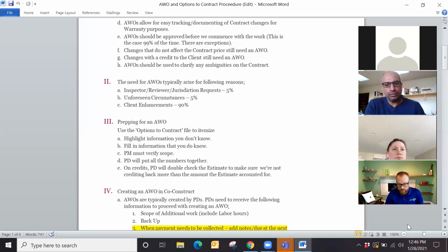But if we had some verbiage in the original contract stating that this could or could not happen, it is not included in the contract, and if it does, expect an additional work order, something up front that gives us leverage against any argument they may have, because it would eliminate a lot of the strategy that we would have to talk about.